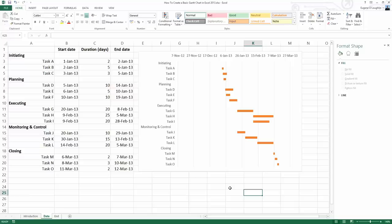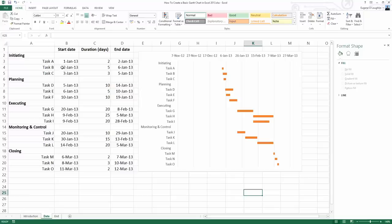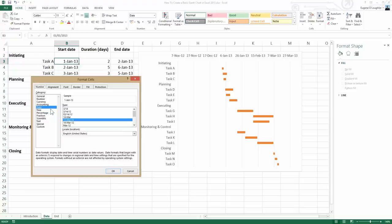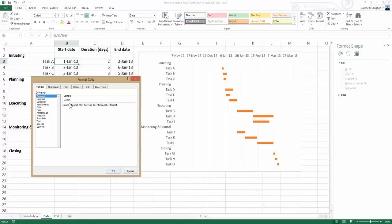The last thing we need to do is remove some of the blank space that Excel puts in before our first date and after our last date on our chart. We'd like to make the brown bars a little bit wider. In order to do that, it's important to understand how Excel stores dates. Let's go back to column B and cell B3, and click on the first date of our project, which is the 1st of January 2013. If I right-click on that cell and choose Format Cells from the pop-up option, we can see this cell is formatted as a date. If I change from Date to General, we can see in the Sample that Excel stores the 1st of January 2013 with a value of 41,275. Make note of that value. I'm going to click Cancel because I don't want to change the format of that cell.